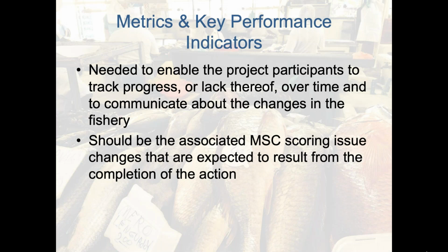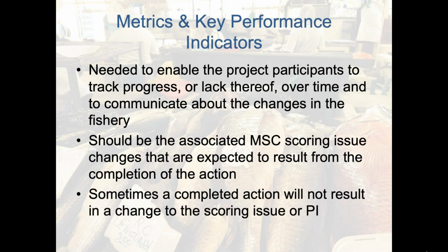And the way I like to think about it anyway is that you should associate your key performance indicators, metrics, action goals, or whatever you want to call them, with the MSC scoring issue changes that are expected as a result of the completed action. The MSC framework already has benchmarks embedded within it that are quite specific at the scoring issue level. So rather than inventing new action goals or coming up with something totally different, it just makes sense to pin it to an MSC scoring issue. So if it's below 60, maybe the action is expected to raise it up to a 60 as a goal